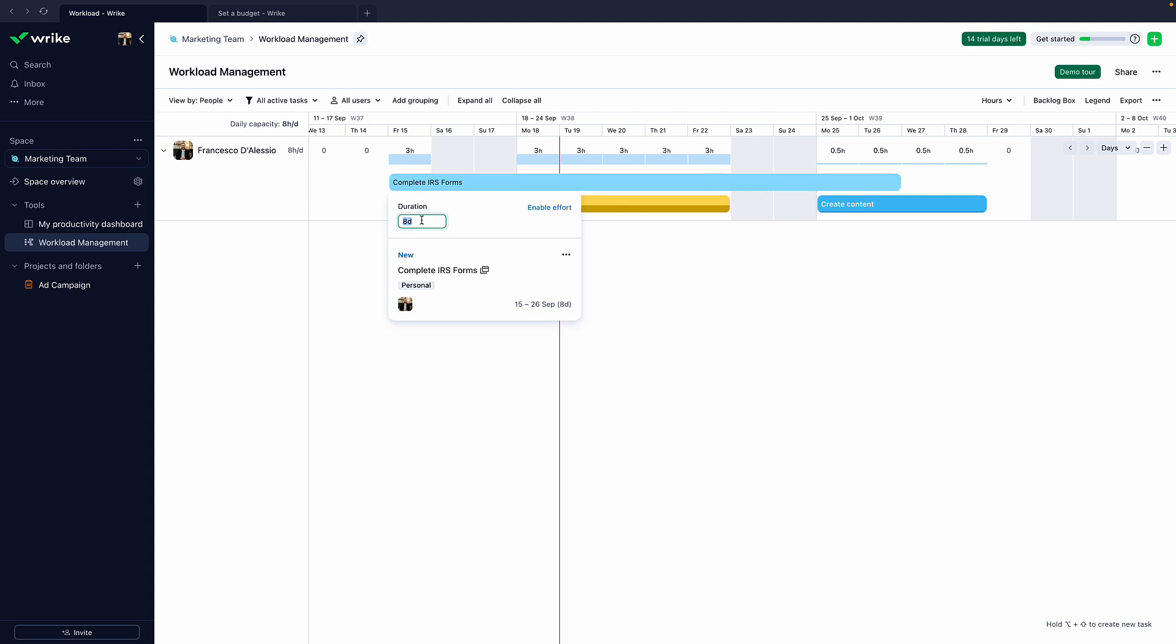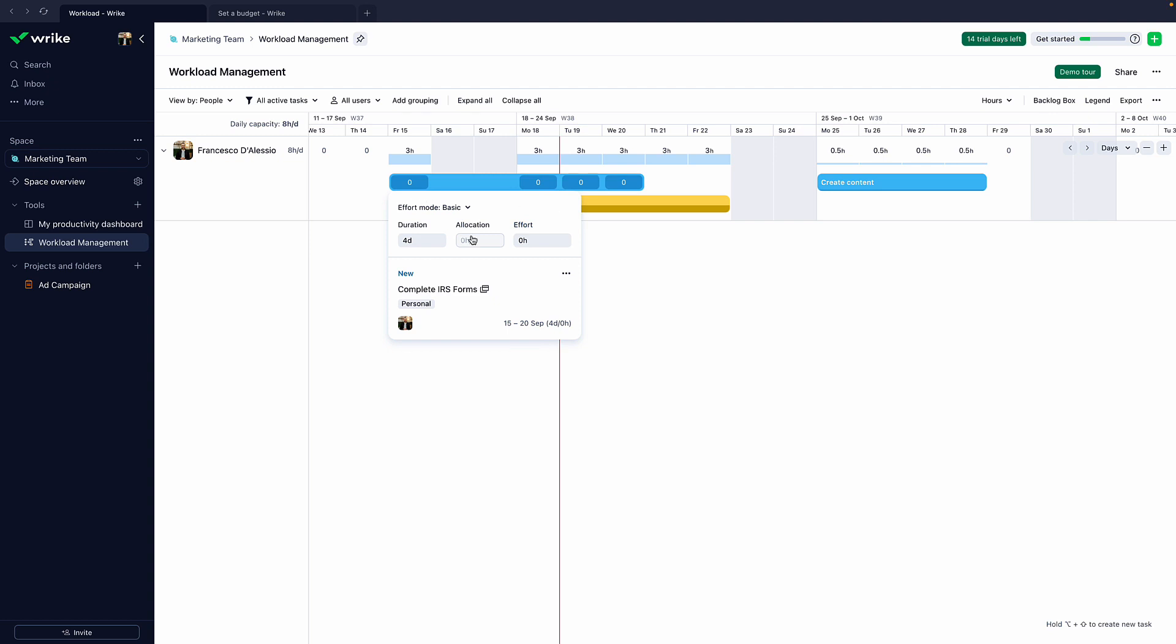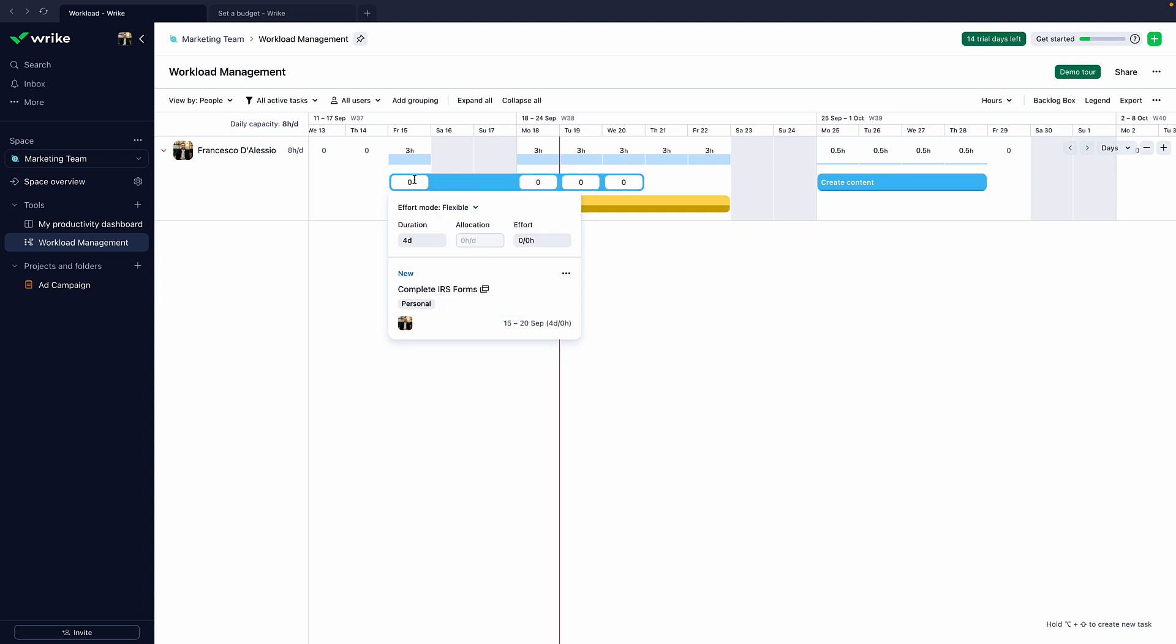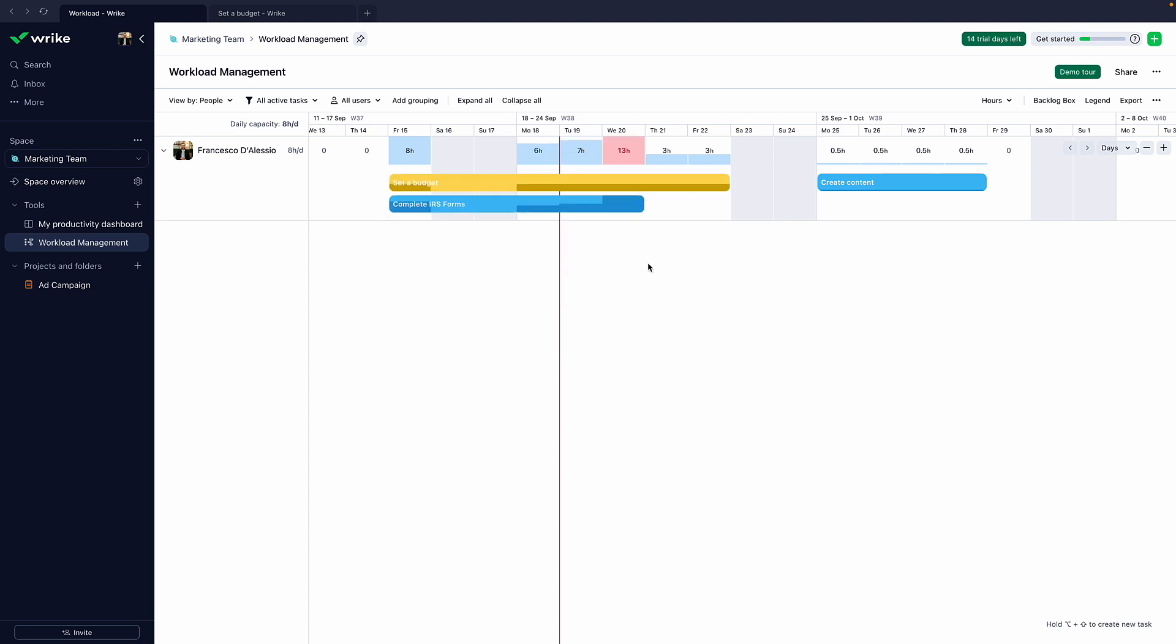Well, let's say this is going to take me four days, you can enable something called effort. And basically, there's three types of effort modes, basic, daily, or flexible. I'm going to go with flexible just to show you. And if I say this, this is going to be five hours, this is going to be three hours, this can be four hours, and this is going to be 10 hours.